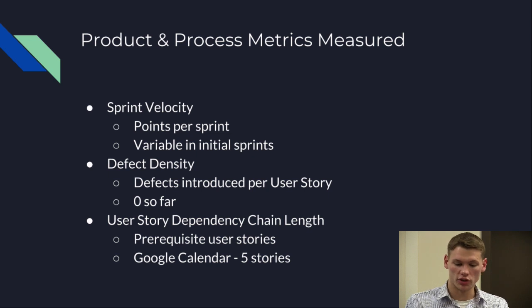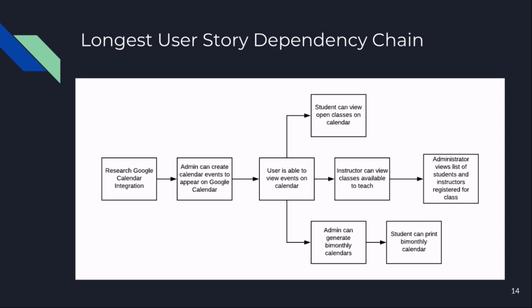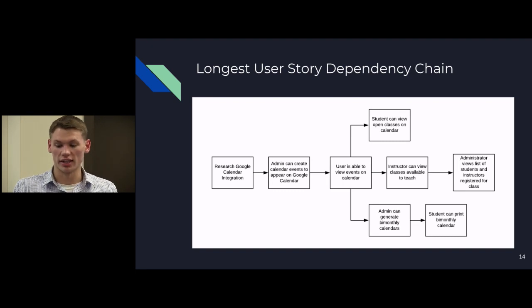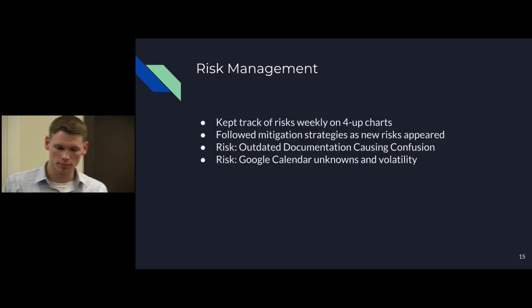The user story dependency chain is the next metric that we chose to record. This is a structure that allows us to see the prerequisites for any user story, which very much helps when it comes to identifying a critical path and also giving you an idea of exactly how long a certain user story might take. I'll show you an example of our Google Calendar user story dependency chain. So this allows us to quickly identify exactly how many other user stories must be complete given any individual user story. And this is very useful in dialogues with the project coach or sponsor in identifying exactly how long a certain requirement will take.